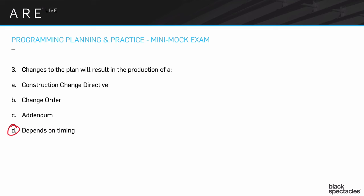And just like a contract, it's going to have the sort of essence of the contract built into it. So the essence of every contract in terms of these kinds of construction contracts is always going to be: what's the scope change? What's the dollar change? What's the timeline change? In exactly the same way that the owner-contractor contract, the essence of that contract is, what's the scope that we're building? How much are we charging for that? And how long will it take? So that's the essence of the contract always. And every change also has to represent those three parts. So change order, also a totally reasonable answer, but only after a bidder is chosen.